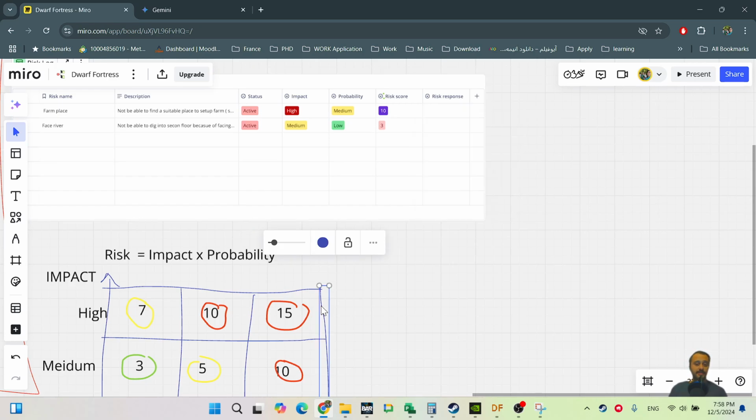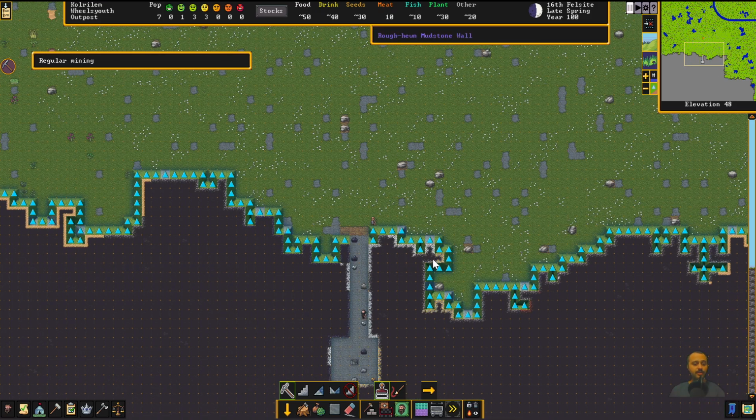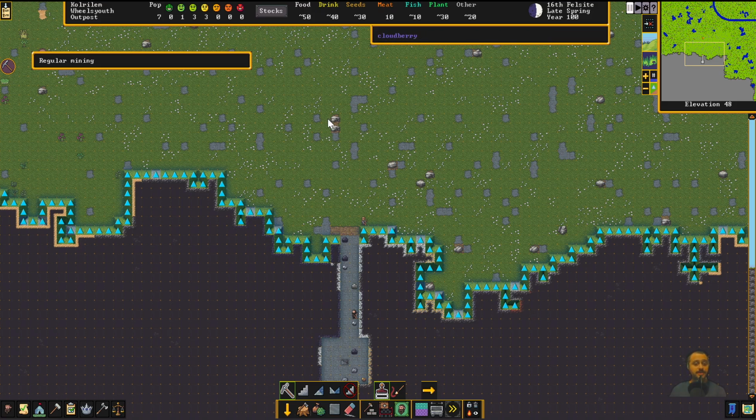Mitigate. When we are discussing the mitigate, you can have the mitigate strategy if you try to reduce the impact or reduce the probability. If you do something that can reduce the impact and reduce the probability, then it is basically a mitigate strategy for you. In our case, maybe we could propose having a temporary farm outside, and if the customer would be able to accept it, then basically you had a mitigation for yourself, because you planned in advance for that solution.